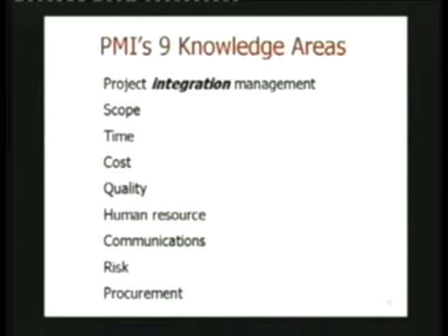Robin, sir. What Robin is saying actually comes under what we call change management. You cannot have a project going and arbitrarily make changes in it. You just cannot do that. I remember when I was a plant production planner, for example, a production scheduler, many times the salespeople used to call the machine shop directly and say, where is my job? Tell me exactly when my job is going to be done. They'd be talking to the machinist directly. This would be such a big disruption because management would not be aware of it, and changes were being made right on the shop floor without any kind of change control in place. So what Robin is saying is very, very critical.